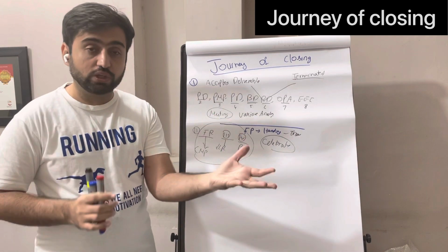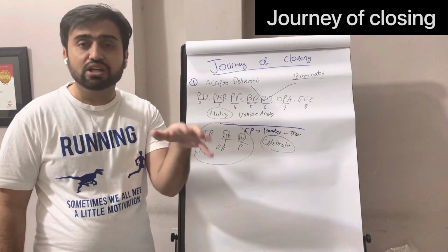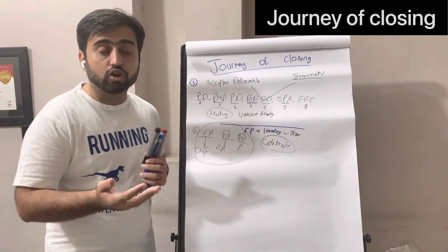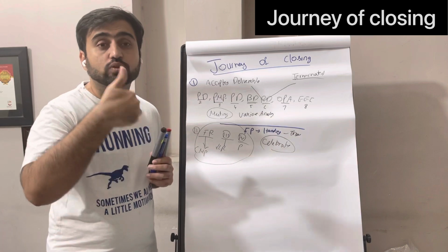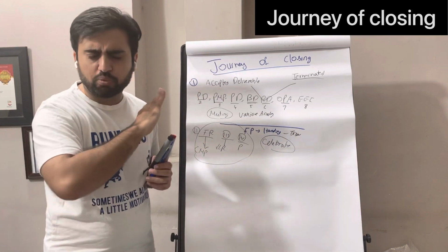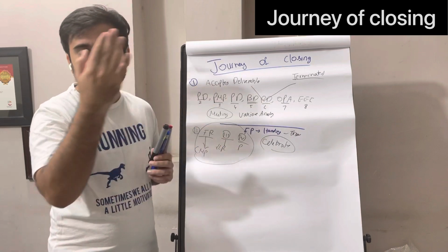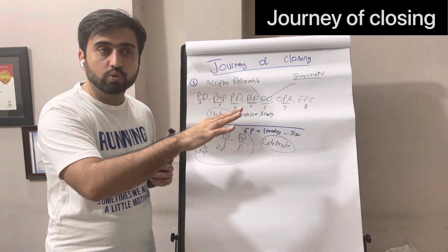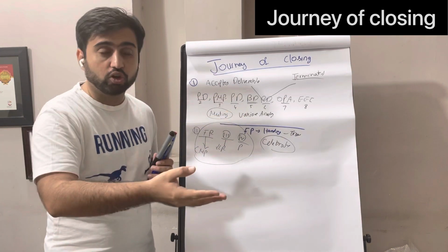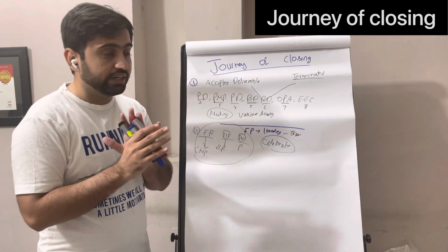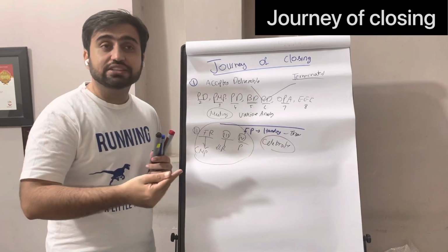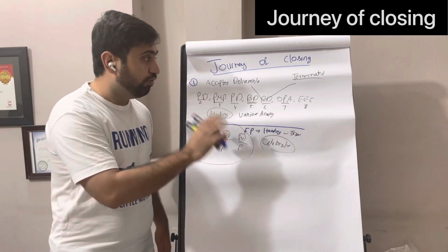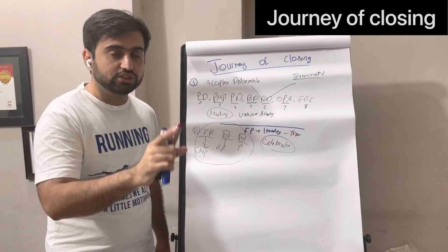So, putting the closing process together again: the accepted deliverables are converted into the final product. We hand it over to the customer. It goes into the transition phase or warranty phase. You start updating documents, you archive the documents, you write down the lessons learned, put them into the lessons learned repository, and you write the final report with all the lessons, even if it's terminated: what was done well, what can be improved, all those things. You give it to the sponsor, who approves it. Once all those things are done, procurement documents are closed, the issues are highlighted, everything is closed, you release the team, you close the project, and you celebrate the success. Very important and very small journey of closing.